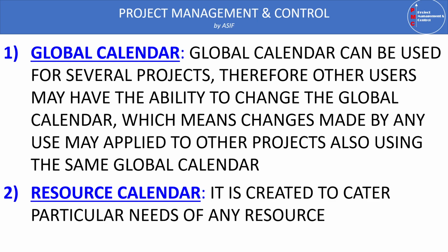Another disadvantage of the global calendar is that when we are importing and exporting the project, and other users get this project with the global calendar and import it on their machines, the global calendar may conflict with their existing global calendar. In this case, when there is a conflict between these calendars, you will get unexpected results which are difficult to explain. Sometimes it happens in the background and we don't know that there's a conflict between the calendars.